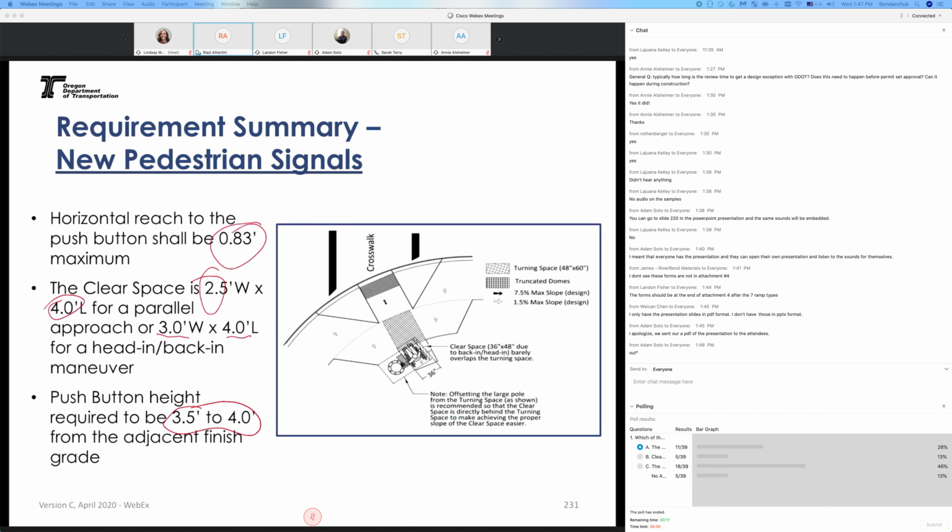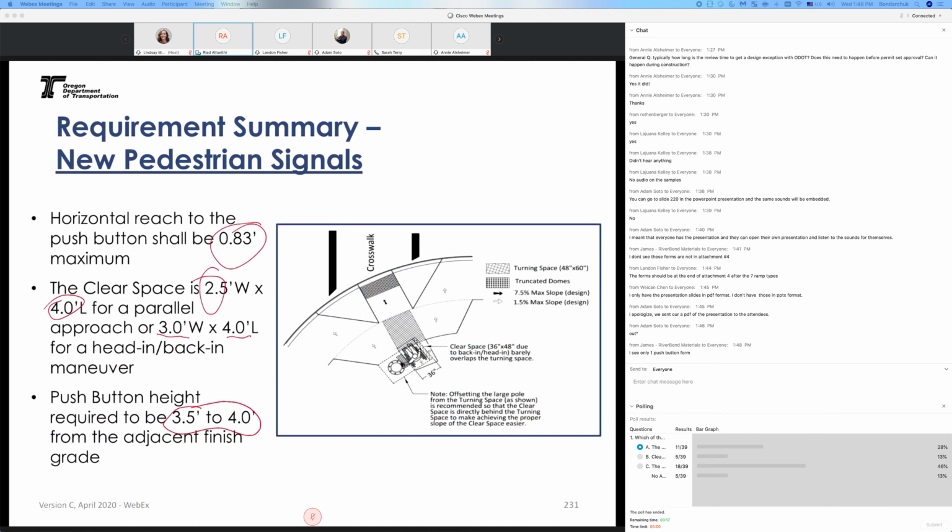Okay, the TPAR, temporary pedestrian access ramp. Part of the traffic control submittal, the contractor needs to submit a TPAR to the engineer. And the TPAR would include the detour for the pedestrian when the contractor is closing that specific ramp and working on it.